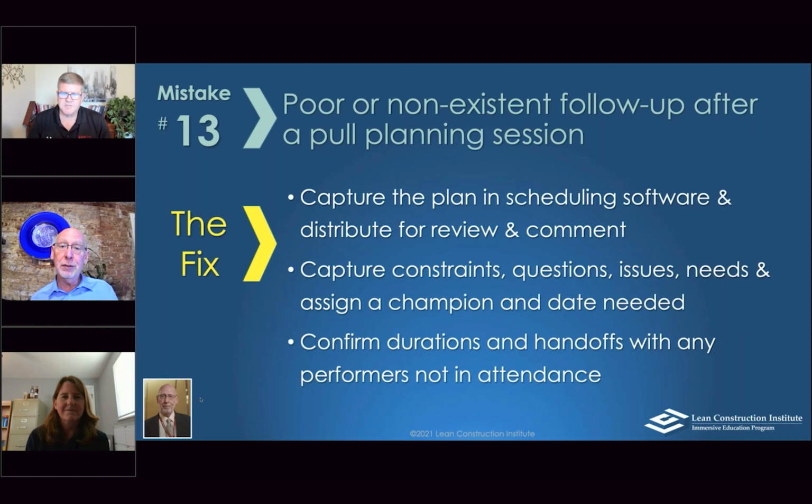Yeah, and I think it speaks, Sean, sometimes to the fact that maybe somebody last minute had a kid get sick or something and couldn't make it, and we had to make some assumptions for them, right? And that does happen from time to time. And it also speaks to where we don't want to hold off doing a pull plan just because we don't have that one contract or that tenth different person signed. Let's go on with it. Let's fill them in later. Let's make some assumptions. And so we get the benefit of doing it on time, like Julie was saying earlier.